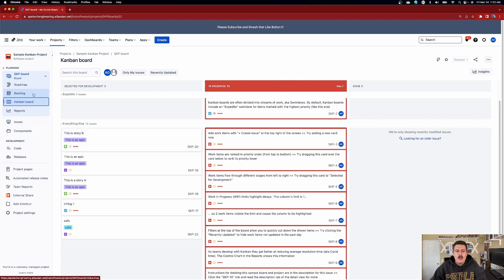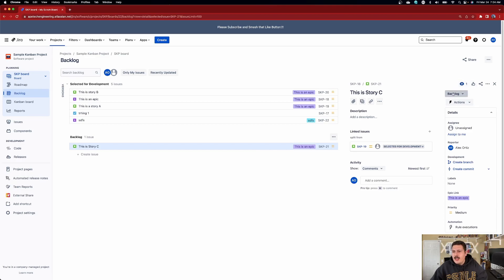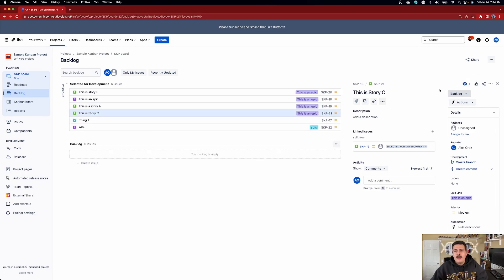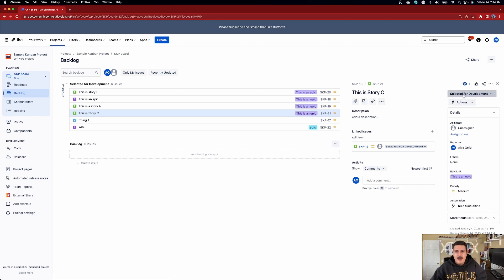One key thing to highlight: moving an issue from the backlog to selected for development is a status transition change. The status used to be backlog, and now the status equals selected for development. For example, when I move this story to selected for development, after a second or two, it will update to selected for development. This is intentional — this is how Kanban works. But if you're used to a Scrum style board, this is not how Scrum works. When you take an item from your backlog in a Scrum project and move it into a sprint, you're not transitioning the issue — you're merely adding a value to the sprint field, which then makes it show up in your active sprint. This is a very key indicator of how these two methodologies fundamentally work in a very different way under the hood.